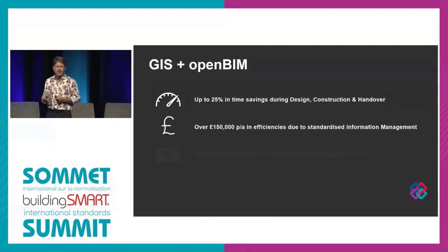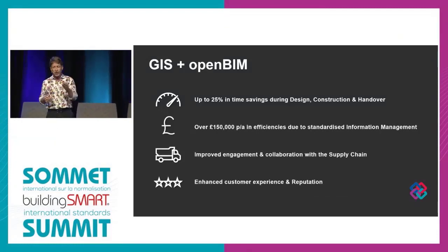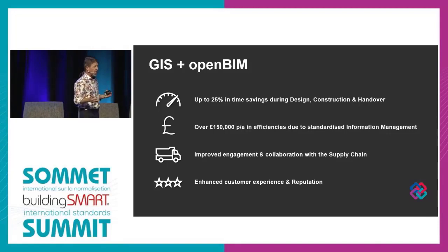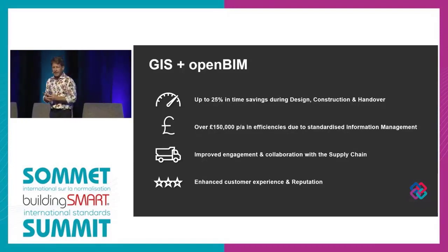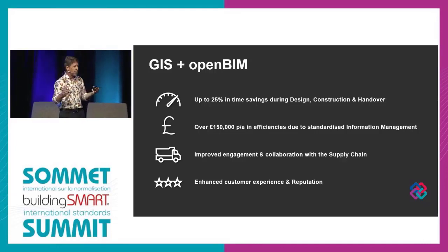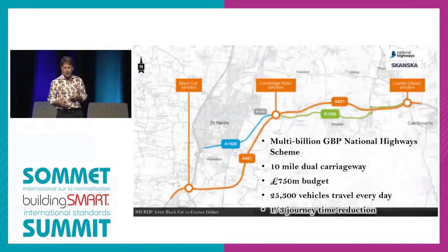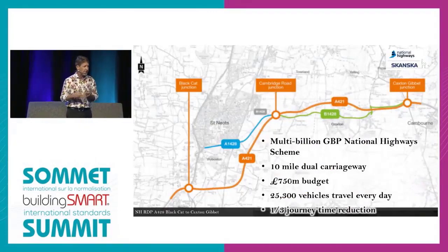So they've seen 25% time savings during design, construction, and handover, over 150,000 pounds of planned versus actual efficiencies, improved engagement with their entire supply chain by delivering solutions that use IFC to bring in data from various formats into a GIS view, enhancing the experience of the customers themselves, their entire project team, and really improving Skanska's reputation.